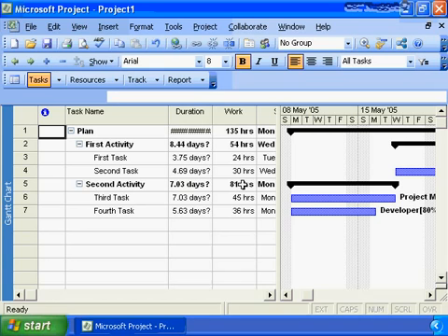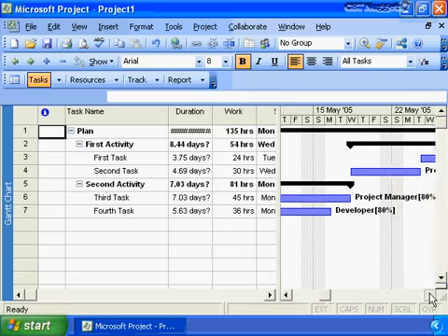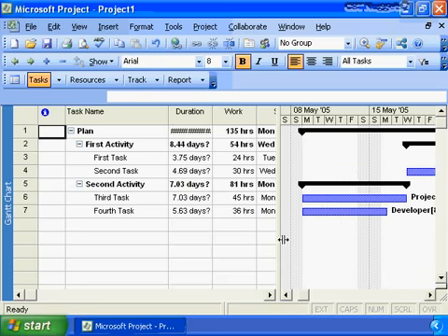It has 45 hours of estimate on it, so therefore I'm going to schedule that first, get it out of the way, so we can go on and do other project tasks. And then I'm going to look for your next hardest piece of work, which is this one at 30 hours, and then finally the remaining task at 24 hours. So that's why it did this rather unique approach to scheduling, and it did the same for our developer, where the developer only had the single task, so it simply allowed the developer to start working on that first task right away on our project.